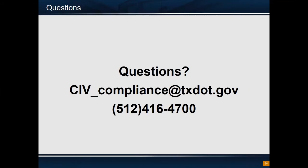When does the local government stop submitting Form 2177 — the prime payment form — and Form 4903, the monthly progress reporting form? The 2177 will come due a month after the final payment of the 4903. Once the prime contractor has submitted all final participation, then a month later the 2177 will come in to address those payments from the previous month. Also note that prompt pay in the 2177 is for all subs, not just DBEs — so all subcontractors fall under that provision. Please make sure you report not only DBE disputes but all disputes.